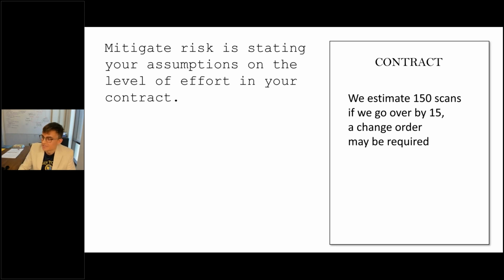Shall not exceed figures are important for change orders. Like, we estimate 150 scans. If we go over, a change order may be required.